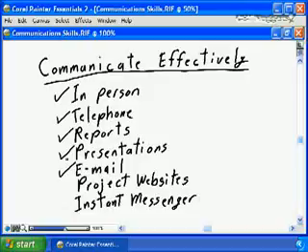A personal favorite that I have for project communications and communicating effectively is developing project websites. Virtually everybody in business today has access to an intranet. Virtually everybody today has some familiarity with browsing the web. If you create a very simple web, it doesn't have to have hours and days and weeks of complex coding onto it. A very simple web structure with a very simple menu front end presenting the information that you need to communicate. Status reports, action items, fault reports, change reports, all in a collected, organized fashion, all within that project website, is a tremendous communications tool that you have, providing direct, immediate access to everybody on your team, to everybody in the stakeholder community, to all of the relevant project information that you wish to communicate.